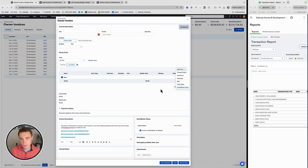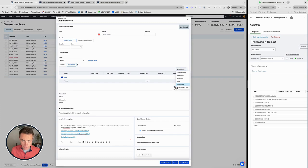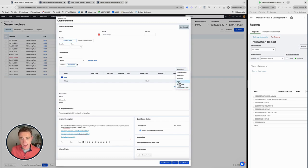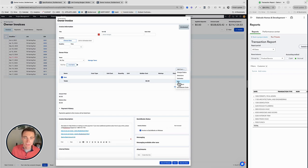Now, what I like about what BuilderTrend has done here is they're only going to give you these options if these expenses exist. So if I don't have any time clock here, this won't show up. Same thing with QuickBooks costs, same thing with bills. And as I indicate some of these, they're going to be removed from the list on future invoices. So we can't really double count them, which is good.